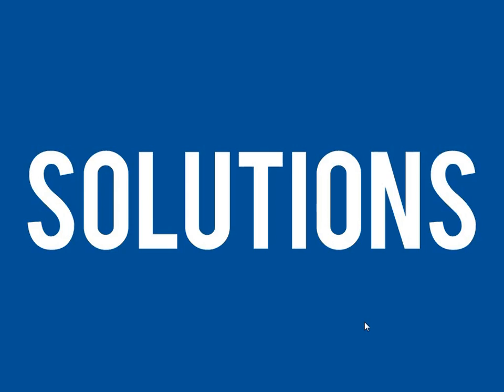Sometimes that is a challenge, though, because that historical data, how we've done it in the past, is experienced estimators are able to do great, accurate estimates where it's not necessarily written down or entered into a database. So you have this newer workforce coming up that doesn't have that information, knowledge, or experience. So there needs to be a shift made in getting that information out of people's heads and into a database so it can be used for future estimators. Also having well-trained and experienced.